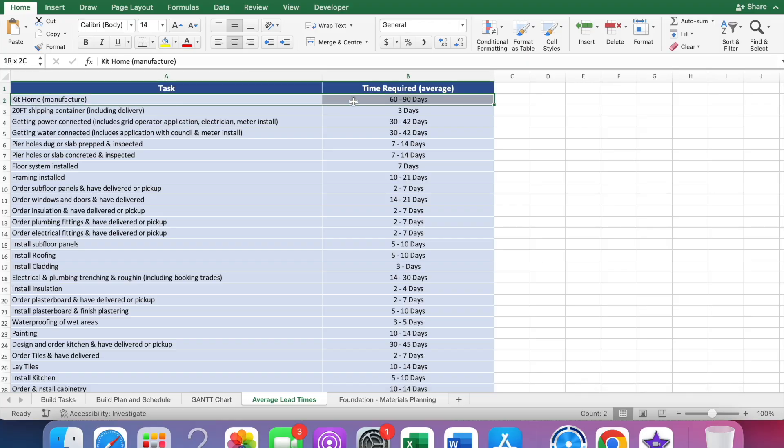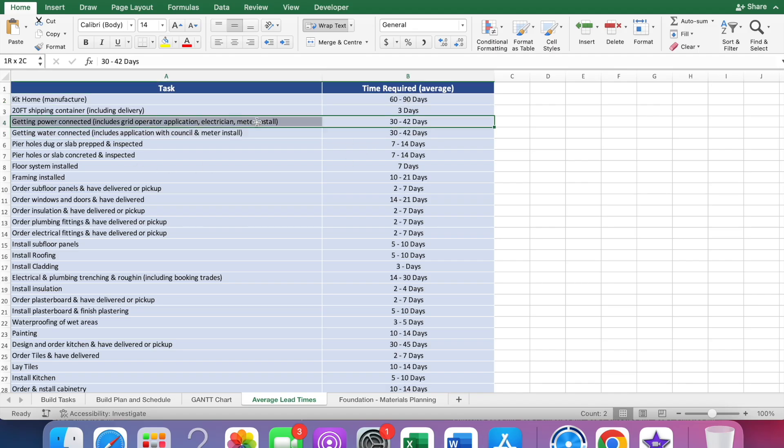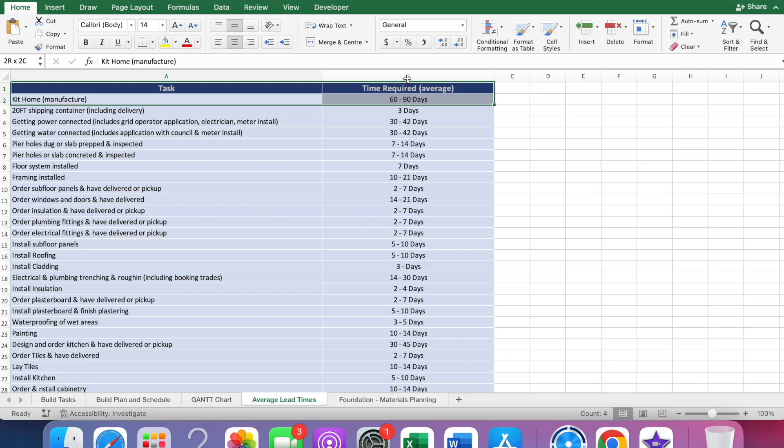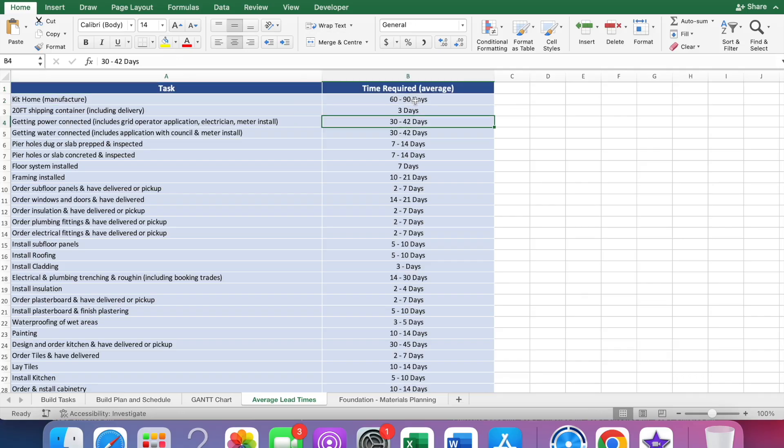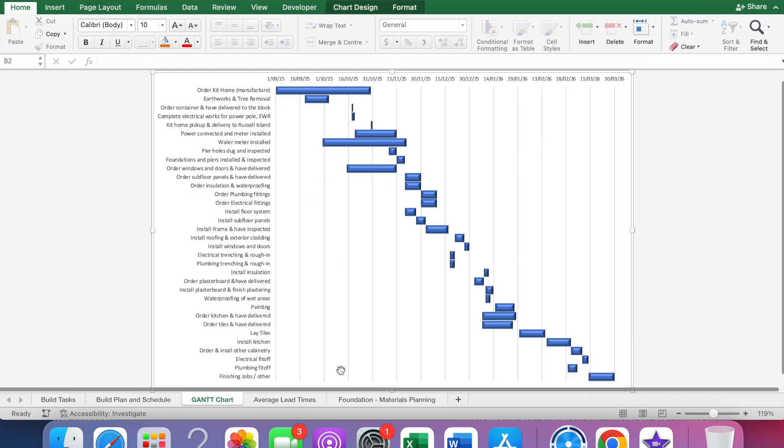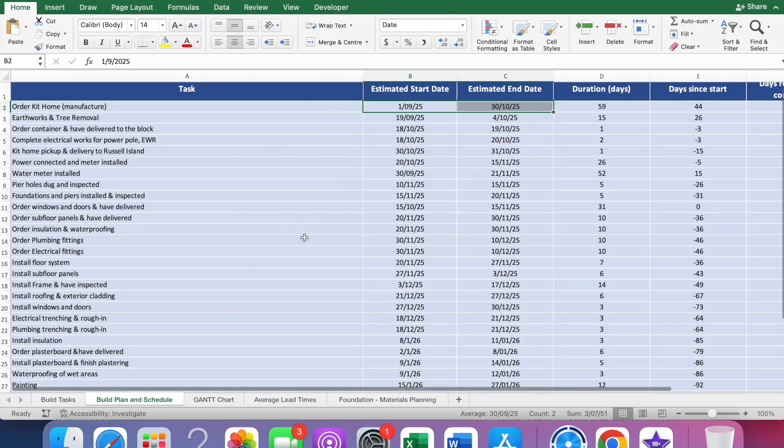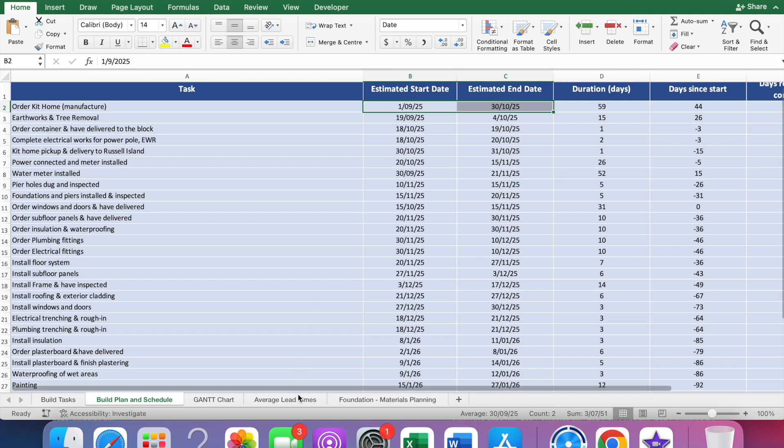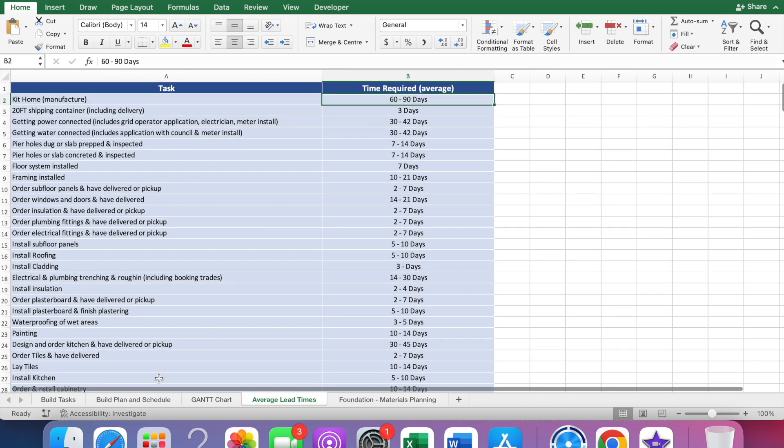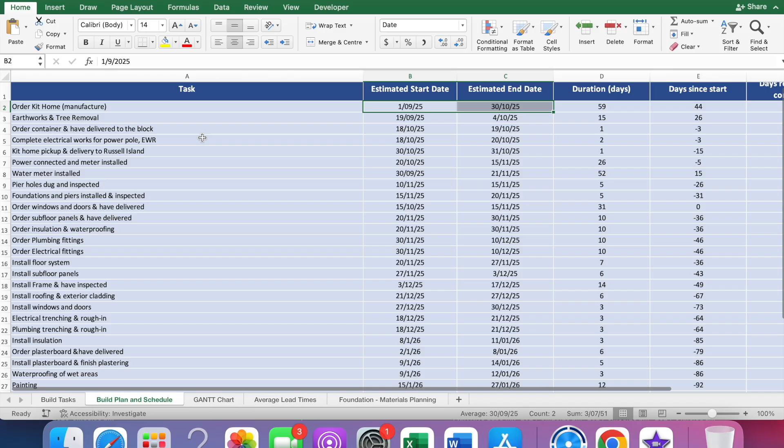I've done a little bit of research - I don't know these time frames from experience. This has just been what I've been able to find online. But it just gives you an idea of the time required in terms of averages for each item. If you're thinking about getting a kit home manufactured, based on how long most of them take once you put them into manufacture, I factor in 60 to 90 days. This can be really helpful if you want to update your own Gantt chart. You can refer back to these average lead times when putting your items in.